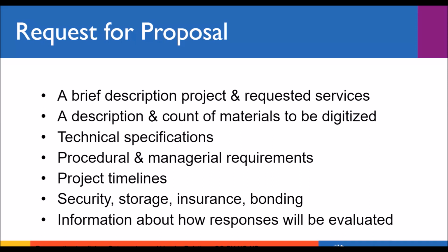Same thing if you have any managerial requirements. Do you have communication protocols that need to be in place? You want to be pushing this information to the vendor as soon as possible. Next is any project timelines. This is also going to be really important, especially if it's a large project or if there are any sort of deadlines that they need to be aware of, because there might be rush fees.